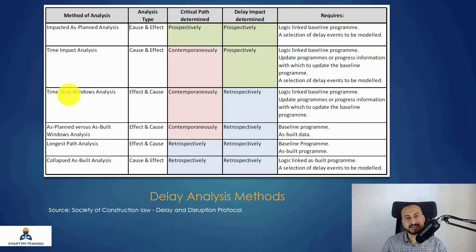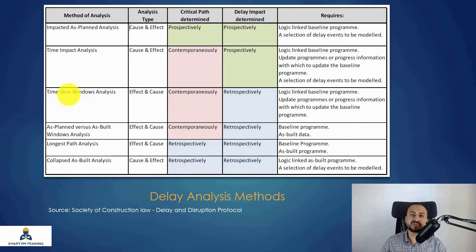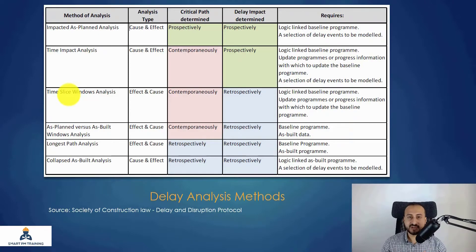IT and construction models are very different. IT is more agile — it adapts to changes quickly and more easily than construction. In construction, a contractor may have three floors of concrete already done, and if the client wants to change them, it's too late. The cost of a change is very, very high, so the model is not agile in construction.